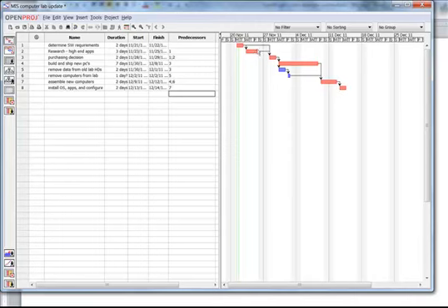Remember, these projects that end on a Friday, they do not show a rollover on Saturday and Sunday. Any project, though, that continues from Friday through Monday does show this rollover on Saturday and Sunday. So the actual work days, this is showing 9 calendar days, but it's actually 7 work days. So be aware of that. Same with this particular task. It's rolling over from a Friday to a Monday.